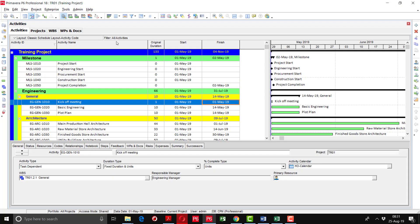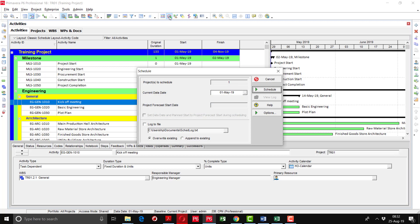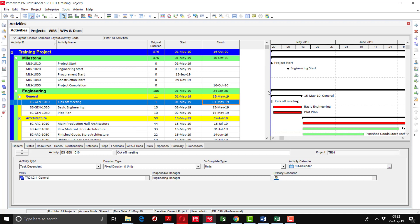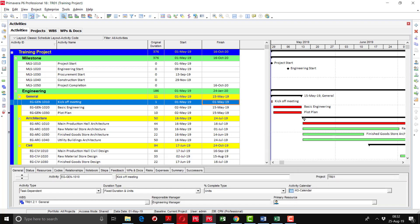To do the scheduling in Primavera, you can see the F9 Toggle Key button. You can either click this button or press F9. After pressing F9, a window will prompt up where you have to enter the current project data date. As we have a planned start date of 1st May 2019, the data date will be the same. After pressing the schedule button, the calculation is done and our project is showing 376 duration, starting from 1st May and completing on 16th October 2020. The Gantt chart has been prepared as well.